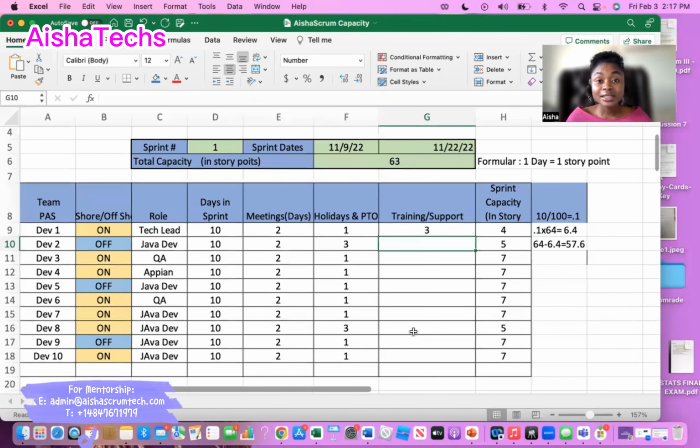Sometimes I see Scrum Masters basically create a capacity planner and just keep it for themselves. That's not the right thing to do, right? It's very important that before you start your sprint planning, you always show your capacity planner so your team can see how you're coming up with your data. And if anything happened in the sprint, you should continue to readjust it. Although it won't change anything, you always write where you got started from.